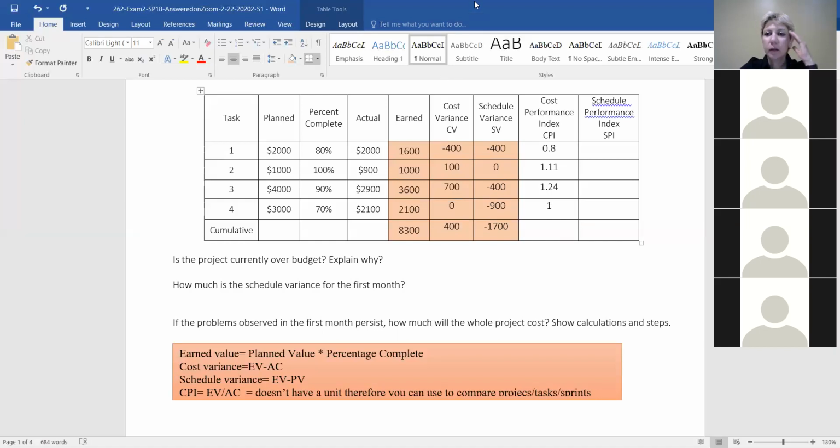All right, do the overall CPI, Nick. For overall CPI, you do the total EV divided by total AC. You want me to write that down and ask someone else? That's okay. Nick R, go ahead, unmute yourself. I'm gonna ask you a few questions.